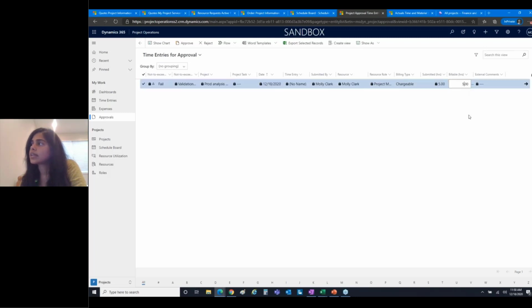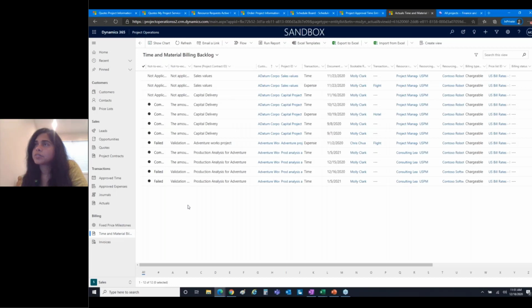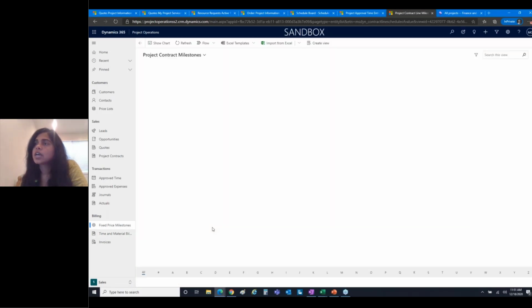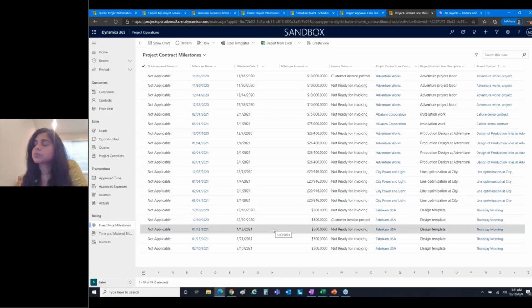And one thing that I'd like to call out here, which is a very well-loved capability, is for me to be able to say as a PM that yes, the resource submitted 5 hours, but only 3 of those hours I want to charge to the customer. So the 5 hours will be treated as cost, but the 3 hours will be billable to your customer. And all of these actuals are recorded in your time and material billing backlog, and even any milestones that you have on your projects are also listed in your fixed price billing backlog.